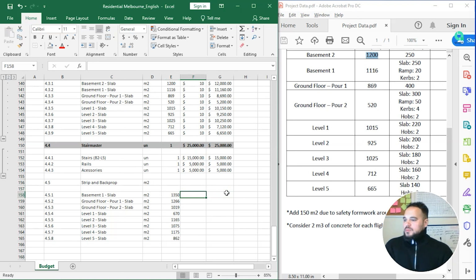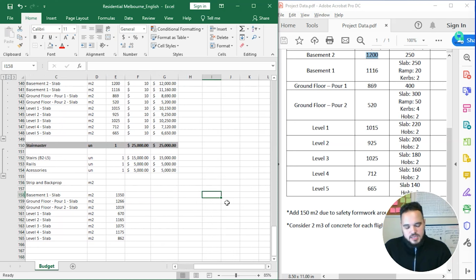So now the price. How much are we going to pay to strip? Look, I have a few. The range of price that I have seen is $12. I'm just trying to remember. If I'm not wrong, it was between 12 and the maximum was 30. 12 is really cheap and 30 is probably expensive. So let's say that the company that we chose was $20.